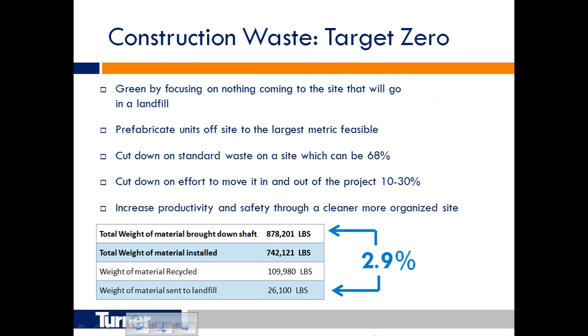The other benefit of this is the green side. We called it lead lean. On our last project, we had looked at what we called target zero. We really started to see that just moving material, when you're bringing parts and pieces to the site, 10 to 15% extra, that material is being moved into the building and then has to be moved back out. And these are significant numbers.